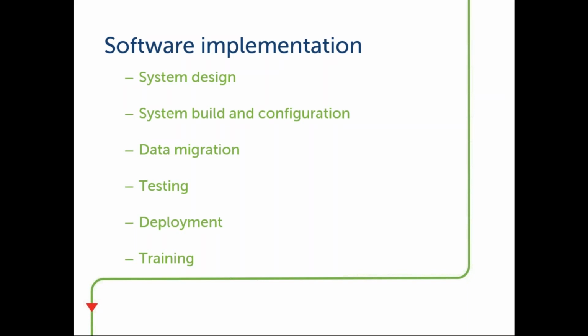The migration of data, so migrating your historical data to the new system will make sure that all of your data is in one location going forward. But it will also help to form the benchmarks for any future inputted data as well. And it's also important to test during this process. Test all levels of data here just to make sure it really translates into the new system.